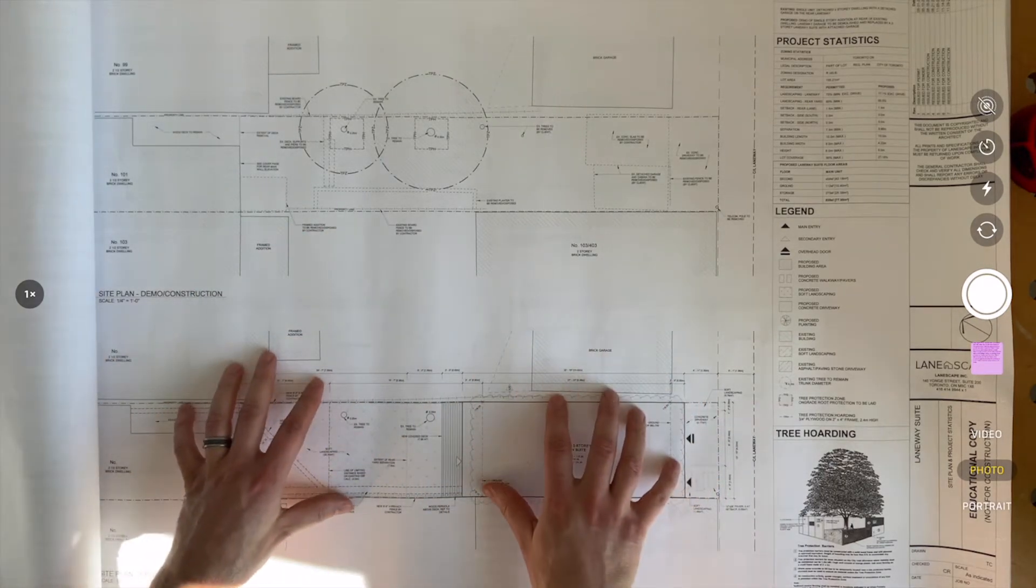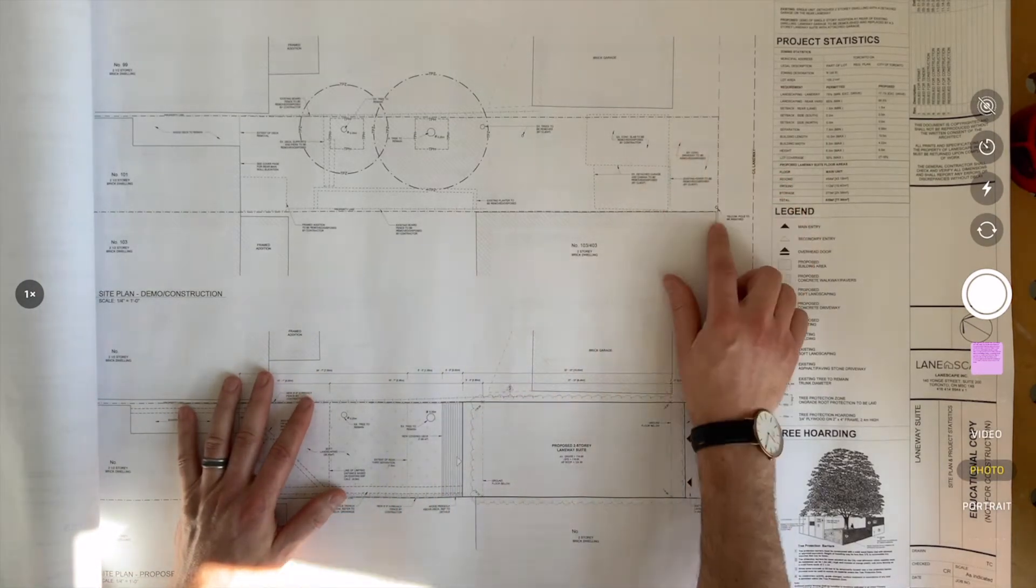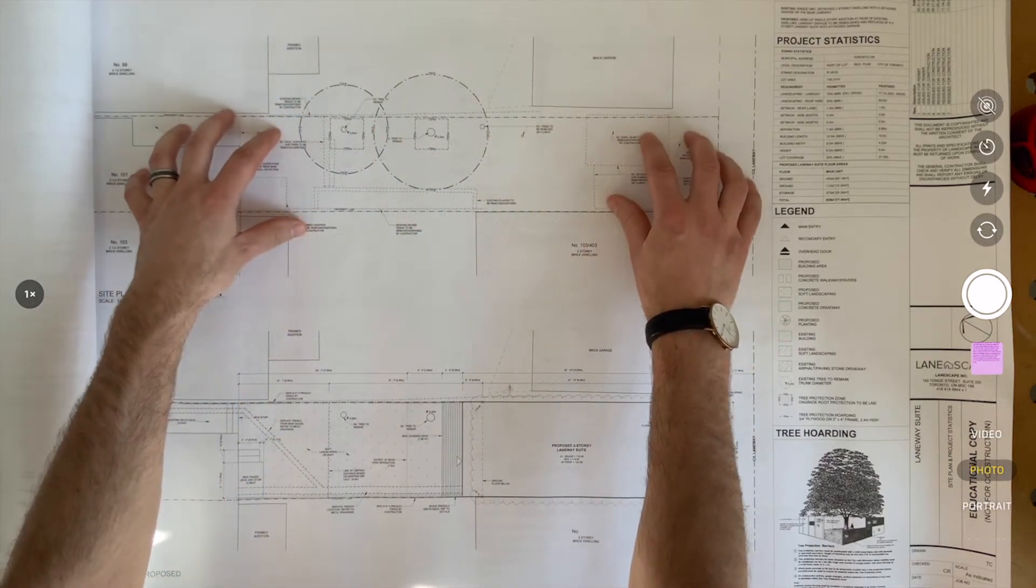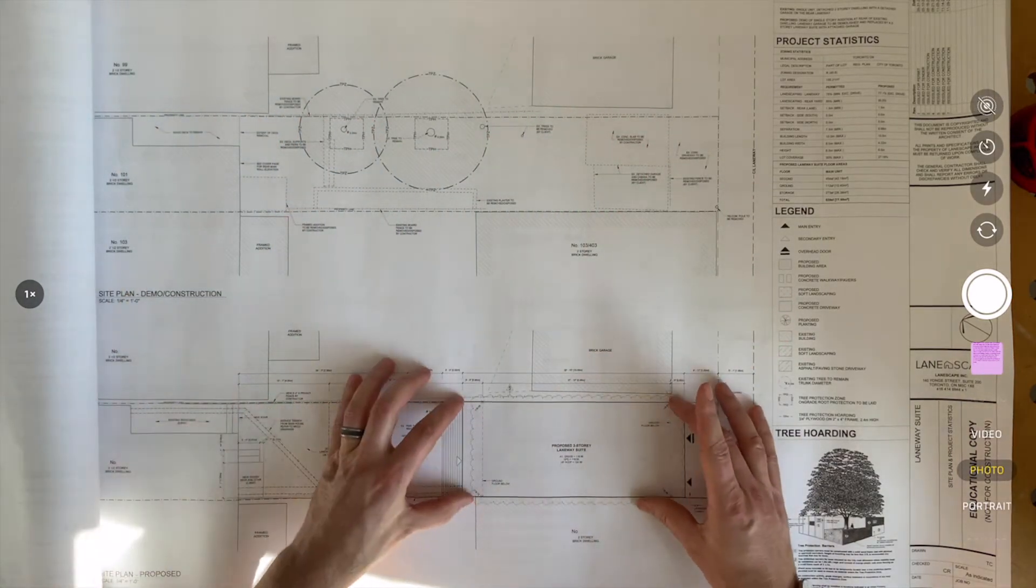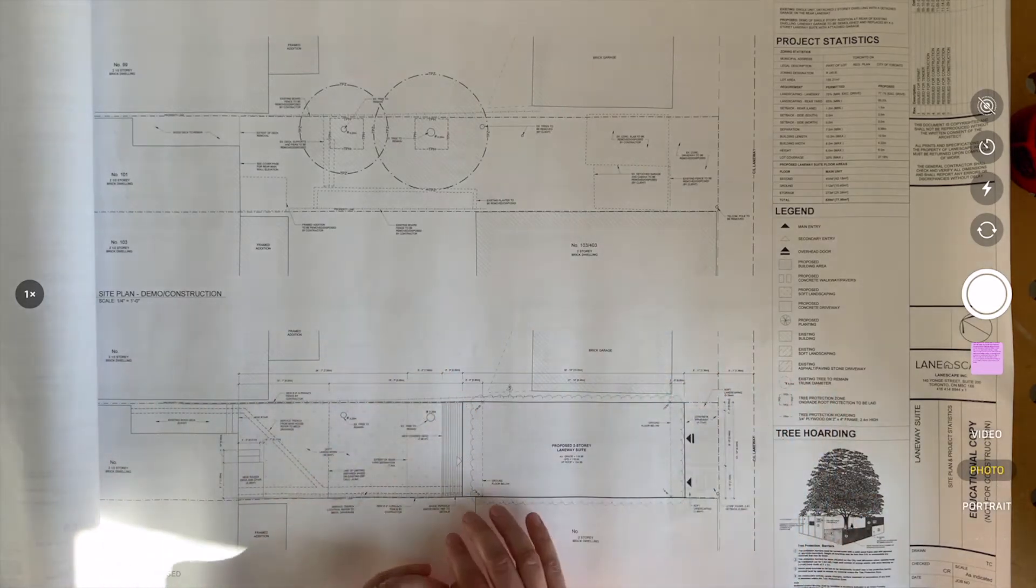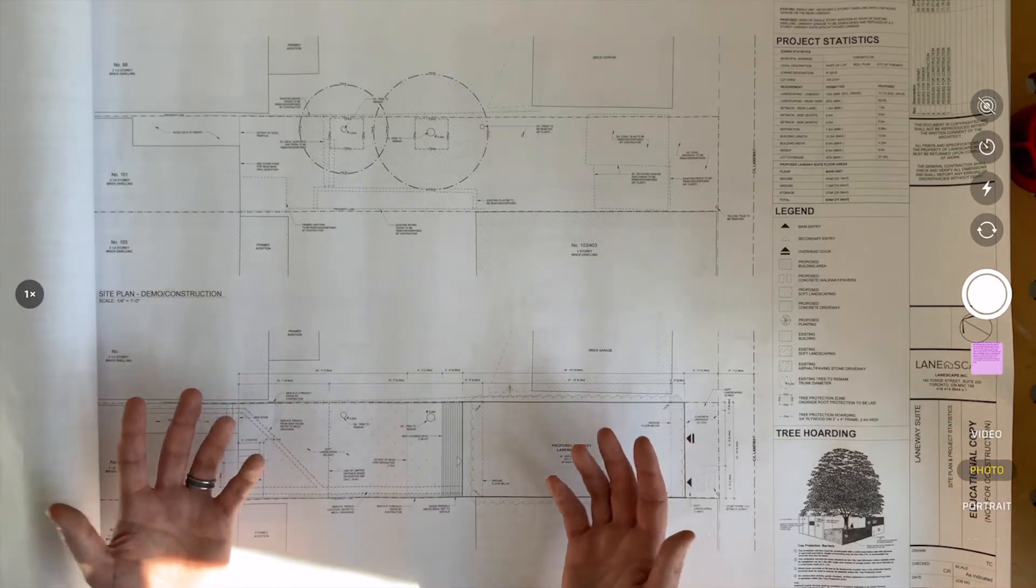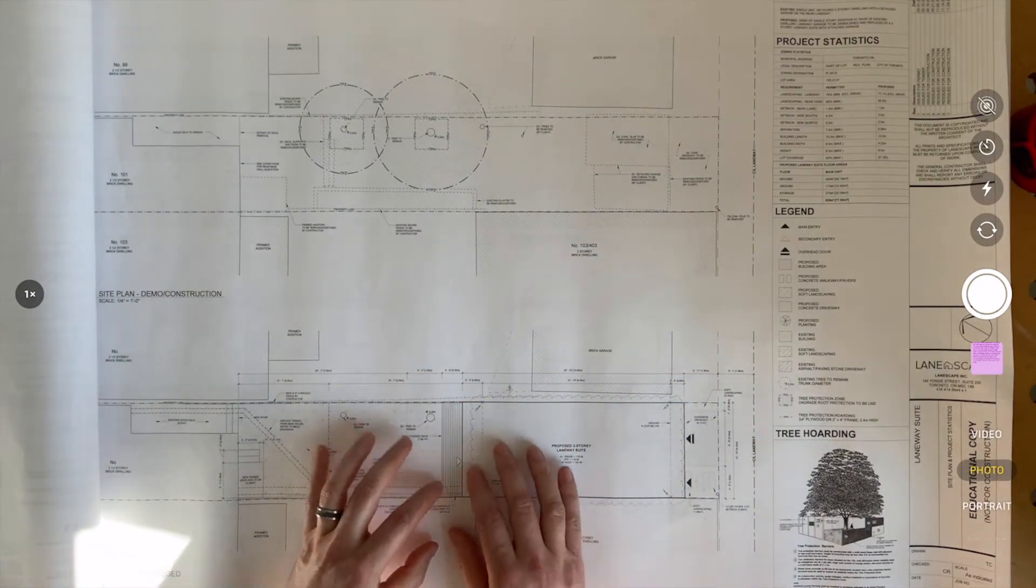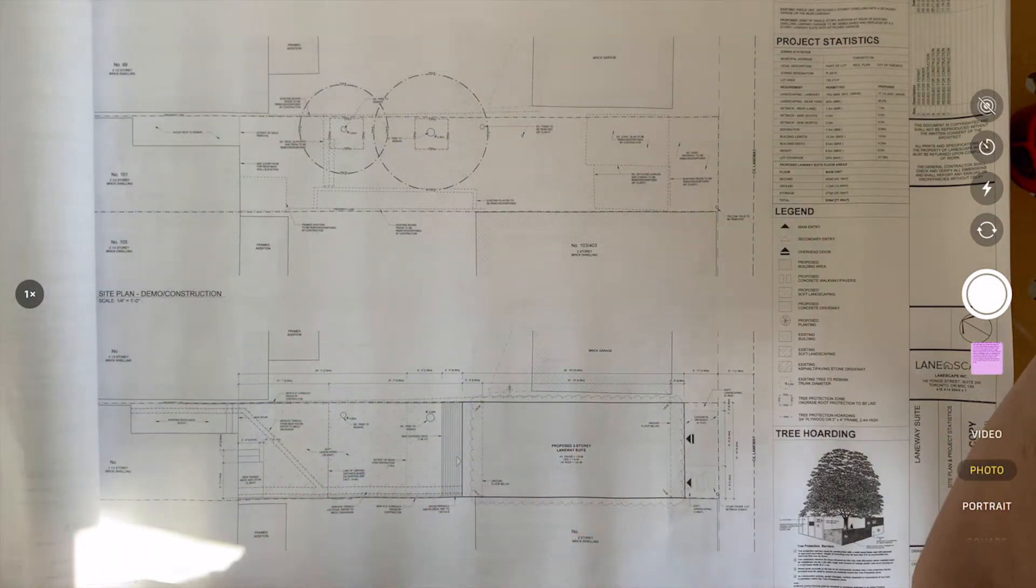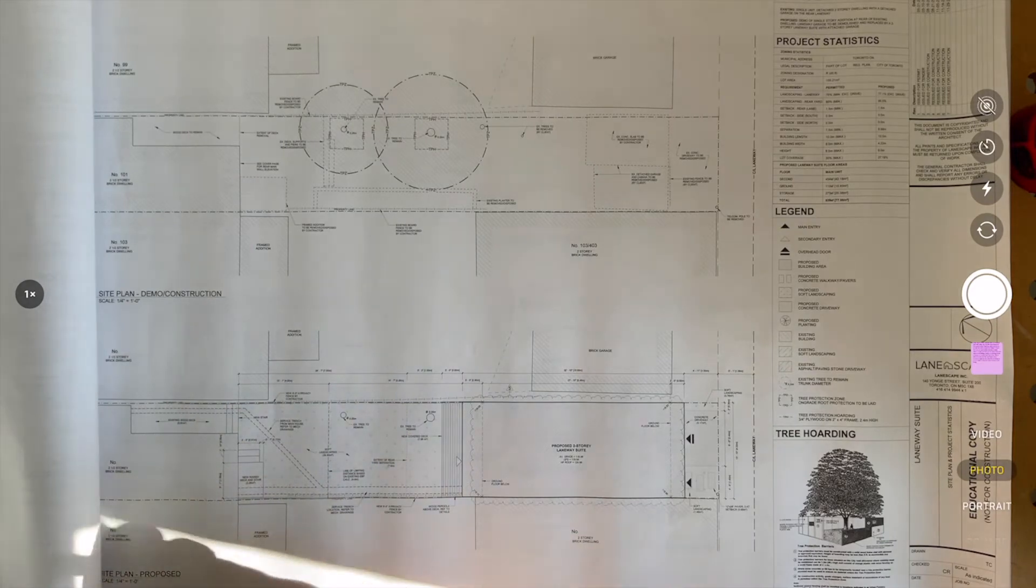So when I look at a site plan, yes it's informative. It gives us the width of a lot, the length of a lot, and in this case shows us the existing site plan condition and proposed site plan condition and where my two-story laneway suite – this is what we're building – is located. That's all pretty crucial, but the site plan contains a lot of what I call hidden activities that are not defined that you need to capture labor for.